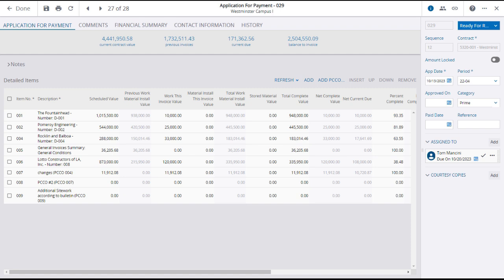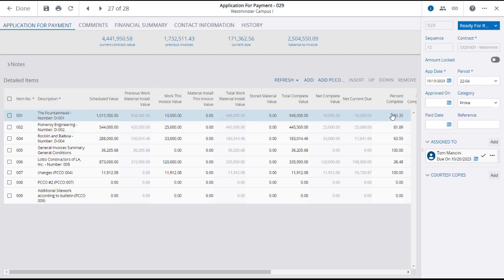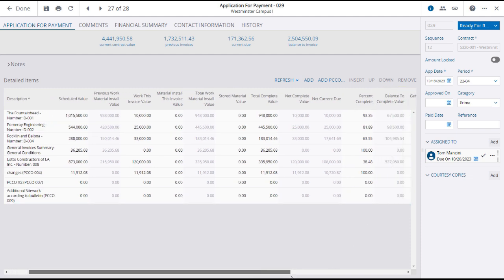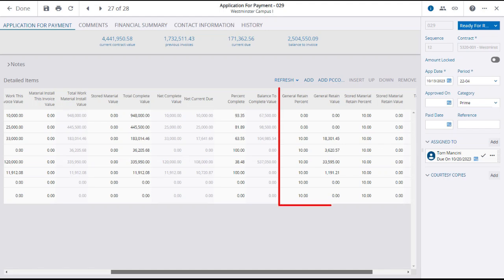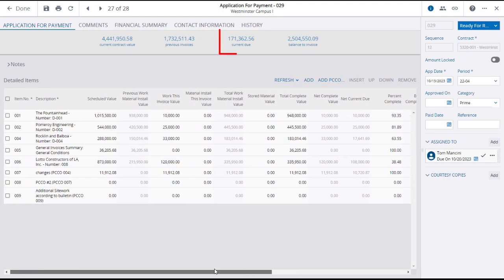The important column fields include Work and Material installed this invoice, as well as the Percentage complete. These numbers, along with the Retainage, you'll need to scroll right to see this, are used to calculate the current due as shown in the summary.